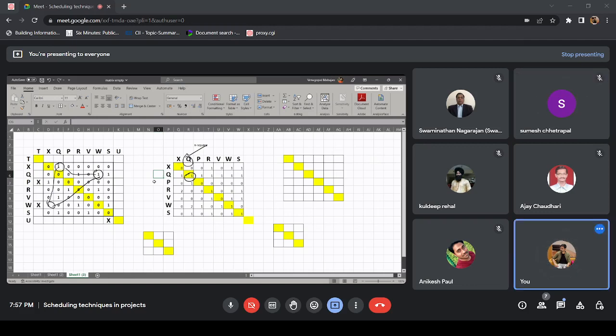Let me start. What is happening is that you have an active block and you want to find out what the cycles are, what the loops are. Now, for finding the loops, in this active block we only have 6 activities. It could have been 200, a huge number. Now you need some place to start with. In the beginning, you don't even know if this activity is in a loop or not. So what you do is you square the matrix once. You don't keep squaring it again and again till the end. You have to go step by step.